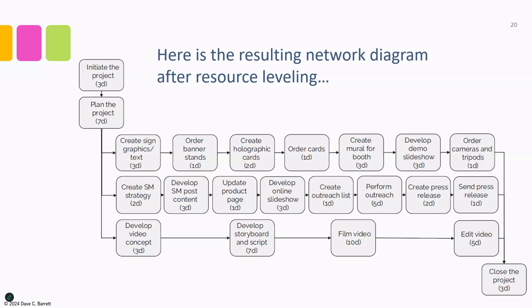This has the effect of cooperating with the resources that we have, but it lengthens the duration of the project. And that's the effect of resource leveling, is that by introducing those dependencies, the total project duration will increase. And that's, again, the interplay between constraints, in this case, between the resource constraint and the time constraint.